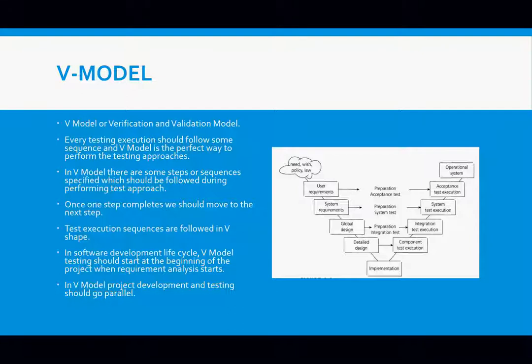In some cases, the test plan now runs into maybe a 100 or 1,000 page document or something like that, because some people will sit down there for like 7 months. What they are going to be doing is writing test scripts. And they can be there for many months writing only test scripts for a particular project, because even the implementation is not yet done. And then when implementation is done, the system must have even changed. The test script is no longer valid. Everything is now changed. So that is the disadvantage of the V-model.